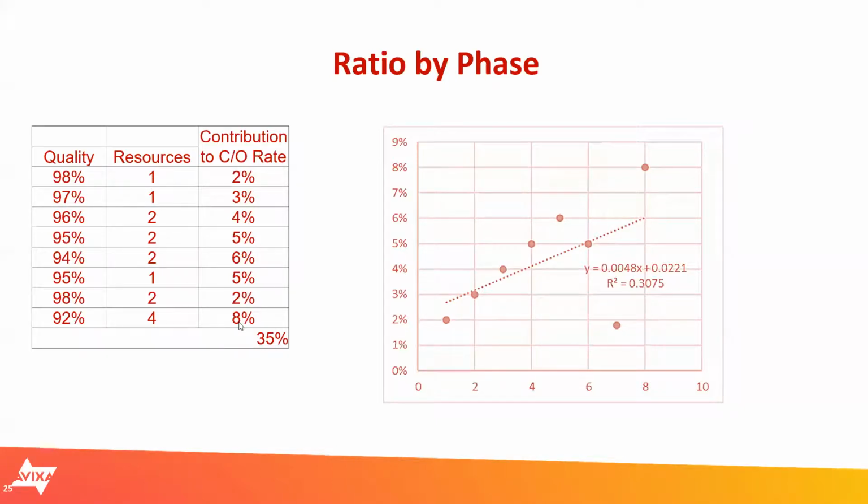Even if there were more change orders, we would go back to the fishbone diagram and do the root cause analysis and find out why this is 8%. Well, when we did the root cause analysis, we actually found that it was because of the lack of the full scope of work, or a clearly written full scope that's understood and agreed to by the customer. So that was a big thing that we needed to fix.